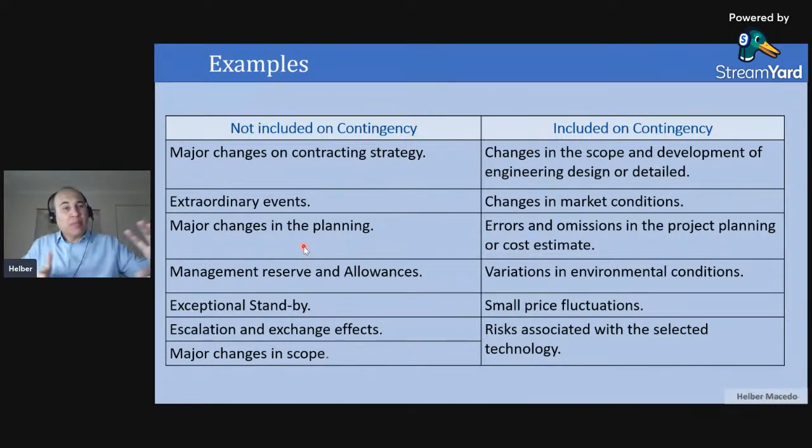This is your whole plan for execution, so zero overtime. But then during the execution phase, you need to move to work 24 hours, 7 days a week. Of course, contingency should not cover this big movement from what was planned to what happens in execution.